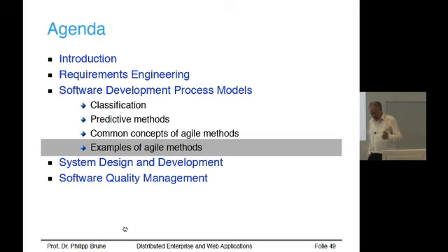So how can you incorporate the production of documents in an agile way, where you are more focused on the implementation? The concept for that is the so-called definition of done. For every functionality, every sprint, every task, we will come to that soon, that you do in agile, you agree in a project on something called the definition of done. What does it mean to have done something? The definition of done is a sort of contract that all the project parties define in the beginning and sign, saying, okay, we agree on that. That has to be done to be finished.